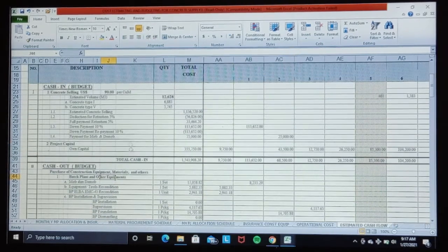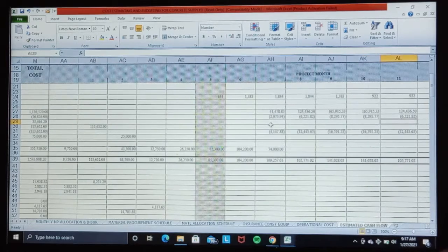Also cash inflow here, which is the plan of paid progress billings as monthly concrete schedule. In this stage it must require excellent skills and experience to allocate cash flow sequentially, referring to all schedules so that it is close to real condition on site and as expected.